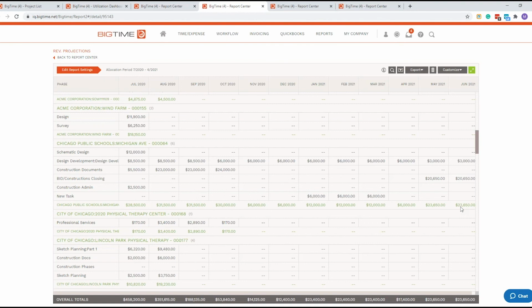So I've had clients who've gone back to the client and actually said, hey, we need another $5,000, and they'll end up adding that as a task or a subtask under it. So then you're still getting that good tracking. And that's again how you can use this for future job costing, because you'll be able to say, hey, we've always been budgeting $10,000 for this. It's routinely taking $14,000. So again, it's going to really start to give you that information. Great question.